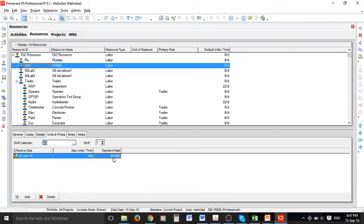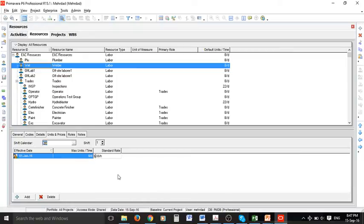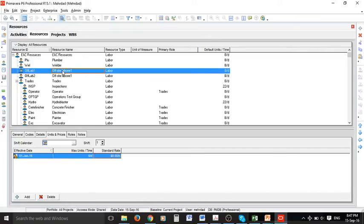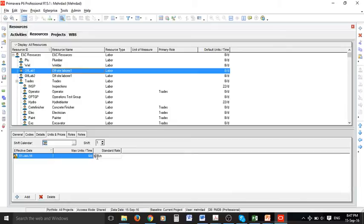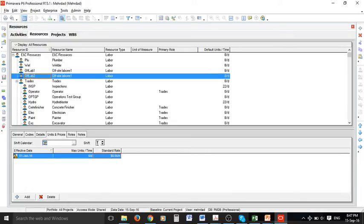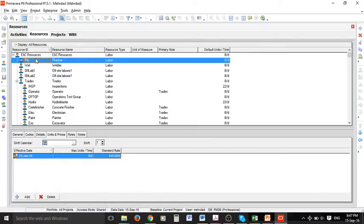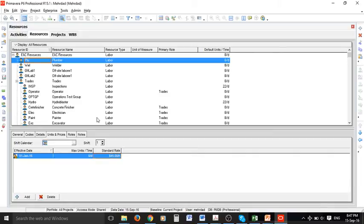For the welder also we can change the hourly rate to $50 for example and for laborers we can change them. So now we have all the information we want. You can define more and more resources depending on your project.